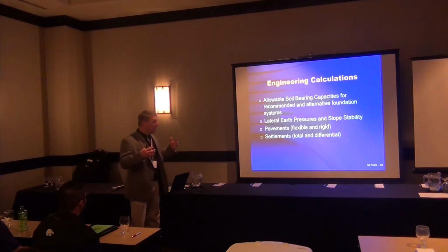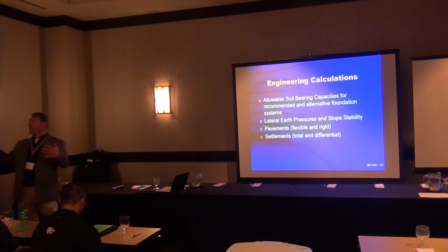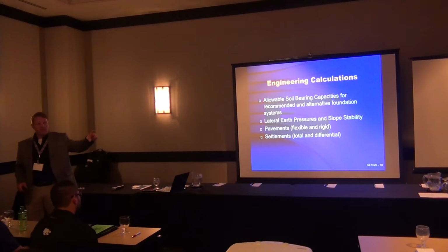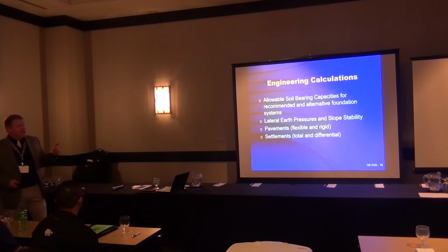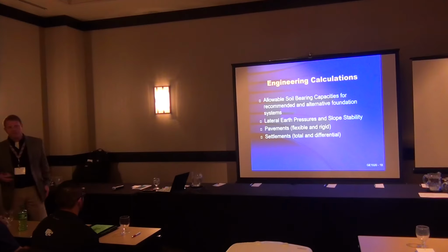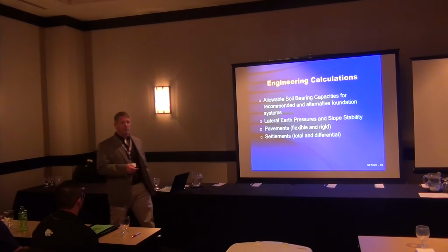We ask most of our clients to give us a set of final drawings so that we can review them and make sure they have interpreted this multi-page document that we gave them appropriately for what they ended up doing. It also gives us a chance to look at it and make sure they haven't changed something. And we probably get less than 5% of our clients that do that. Most of it's scheduling, they say; we're trying to get it out on the street for construction, get it built, all that kind of stuff. But the faster we go through some of those steps without having some of the quality control, the more opportunity there is for risk.